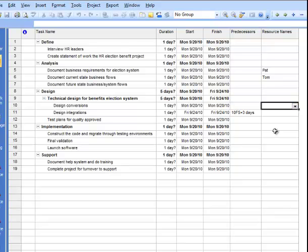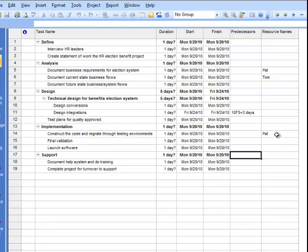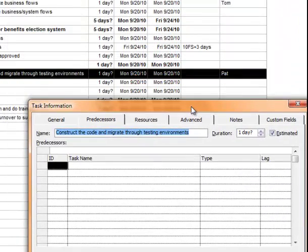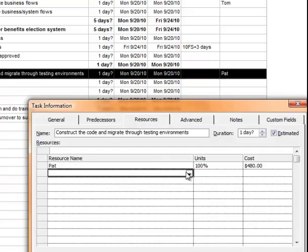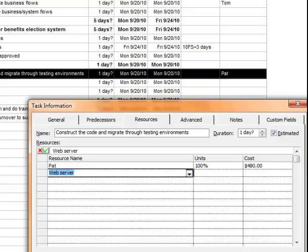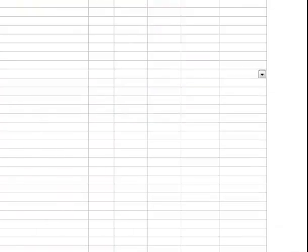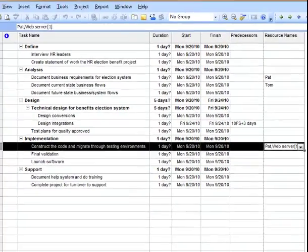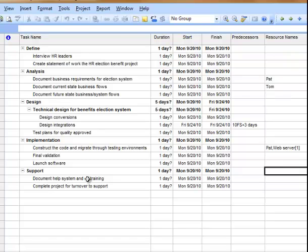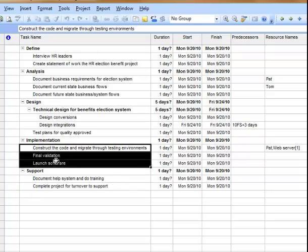And if we are going to put Pat on one of these tasks and want to add Tom to it or some other resource, another way to get a little fancier, double click, and now with the task information box, I can go to resources and drop in any material or cost item or labor item, press OK, and they are displayed in the column. A finished plan will have resource names on all of these non-bolded low-level tasks.